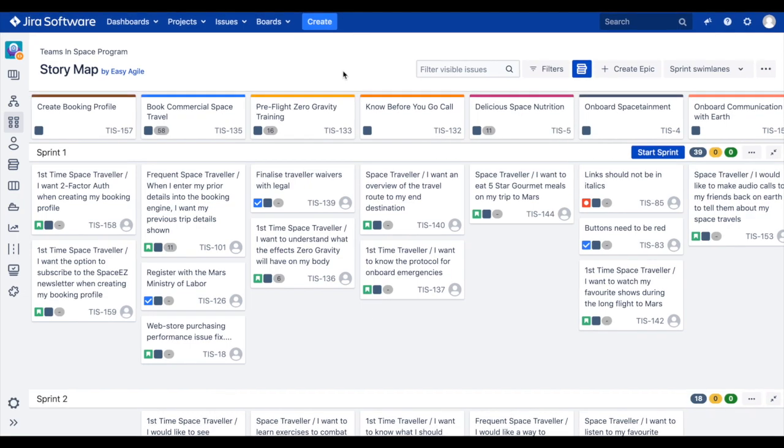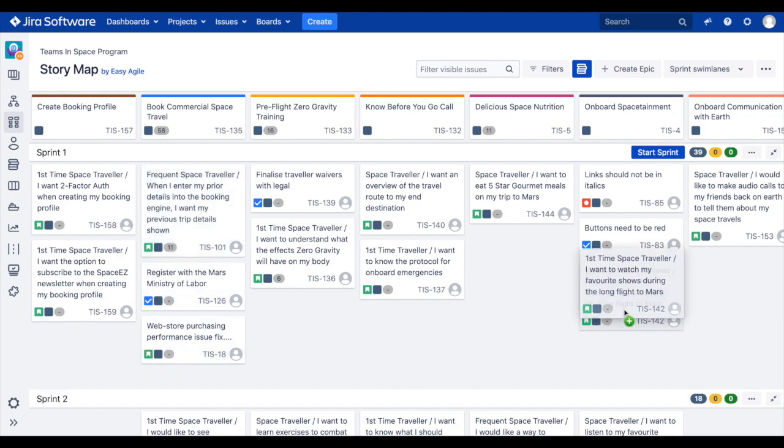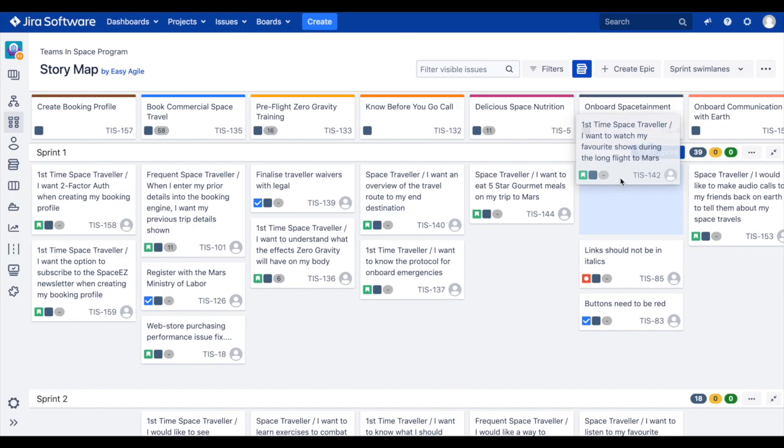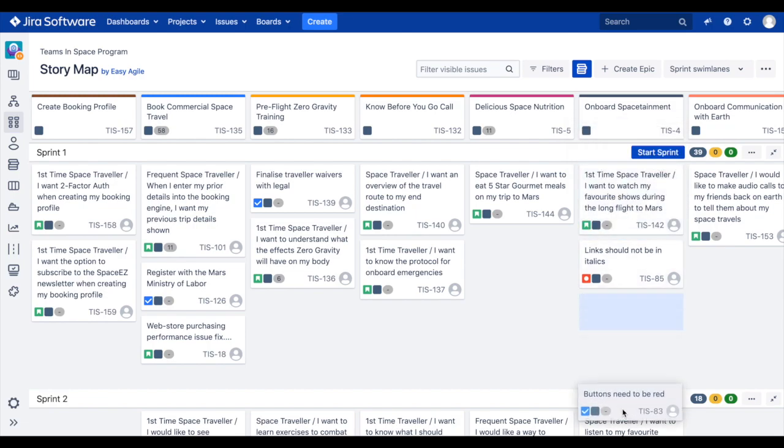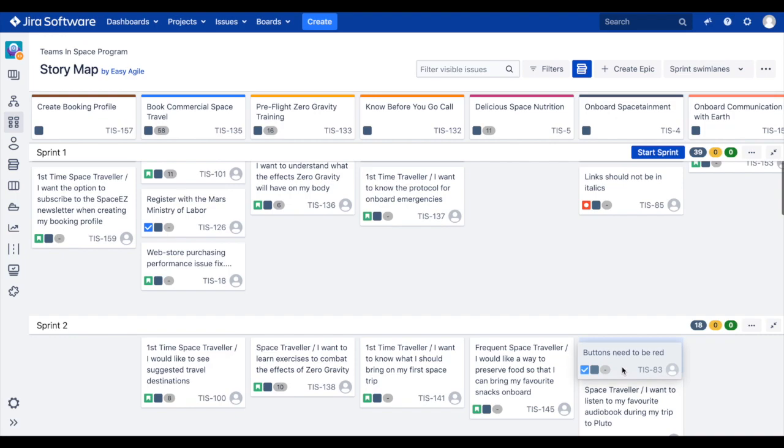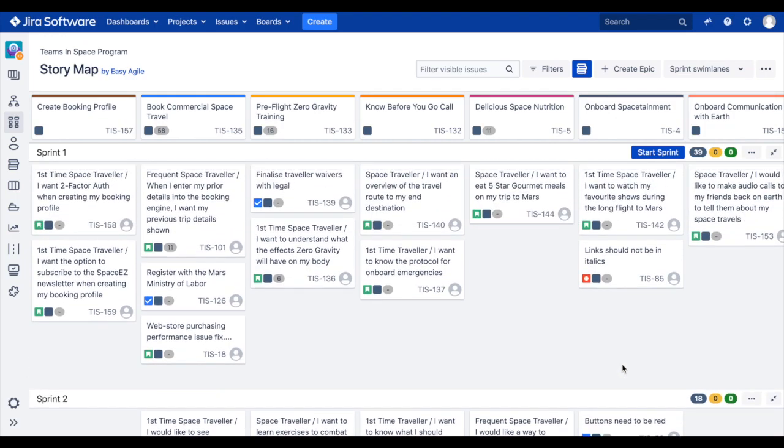As we learned in part one of this series, user stories should be ordered top to bottom in terms of the value they deliver to customers. In Easy Agile user story maps, we can rearrange stories by dragging and dropping them within a swim lane and between swim lanes to show their value to our users and how we are prioritizing our work for delivery to our customers. Moving issues vertically will also update their rank on your agile board on your JIRA backlog.